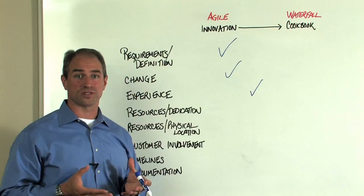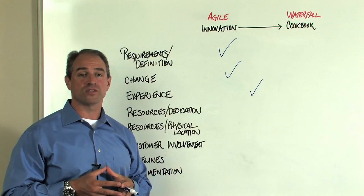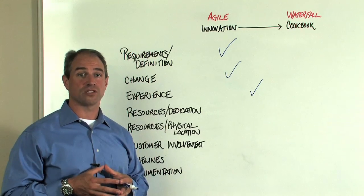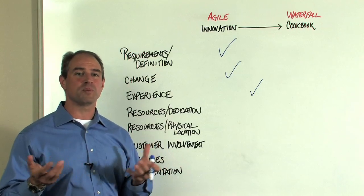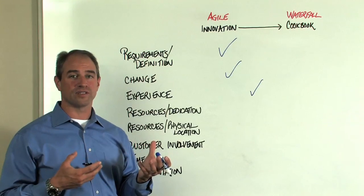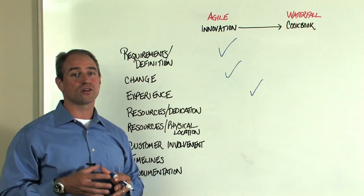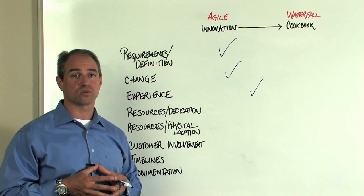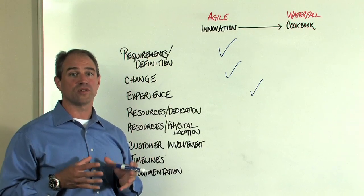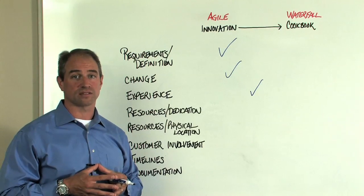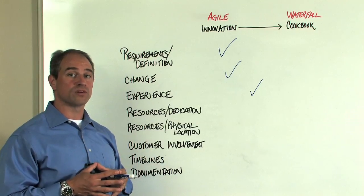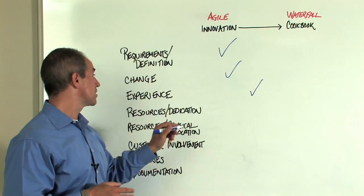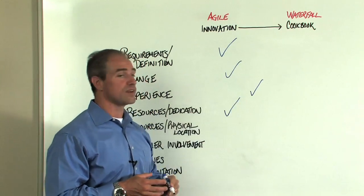The next area is resources. Do we have the right resources that are dedicated to this project? Or do we have some people that are maybe part-time or not fully dedicated to the project? It's critical in an agile project to make sure that your resources are dedicated during the times that we've committed to that project. If we have the right level of resources and we can commit them to the project, we'll be closer more towards an innovative type environment.